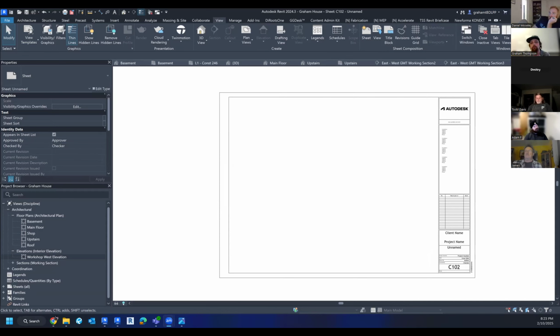Submittals are like 3 weeks minimum. It doesn't matter who you are, unless you have someone that's really, really reviewing them, or you're using products off of QPL, which is a qualified product list.